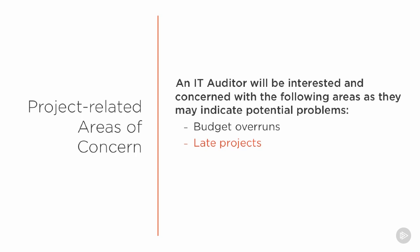Those three elements are really locked together. If we're going to change the scope of the project, we're going to have to change the budget and time allocation. Very often, little changes creep in and we don't realize how many changes have actually been made and how this will make it impossible for that project to deliver on time or on budget.